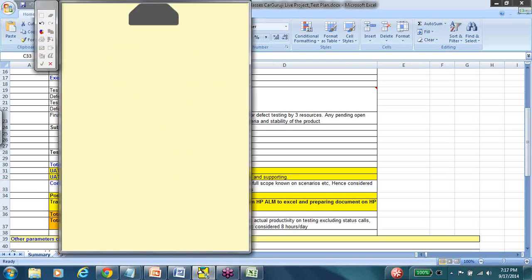Now, yesterday somebody was asking me, how can I tell how much time it will take for me to test, or how many steps I can come up with? Now, the industry standard, again, subject to change: yesterday we wrote 2 test cases. If we are writing test cases of that nature, the standard is that one person can write 30 test cases per day.